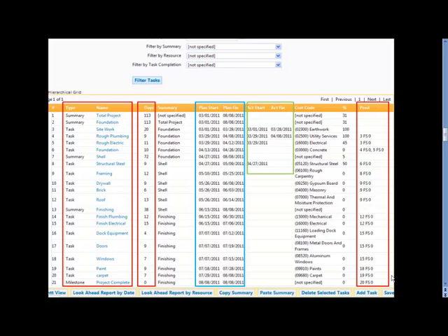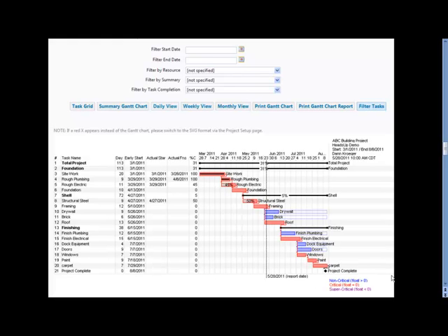When a field report indicates that a task has started, the actual start date is recorded. When the task is completed, the finish date is recorded. These are shown here outlined in green. The schedule may be displayed as a Gantt chart. The critical path appears as red task bars. If any of the red tasks fall behind their scheduled date, they will push out the end of the project.